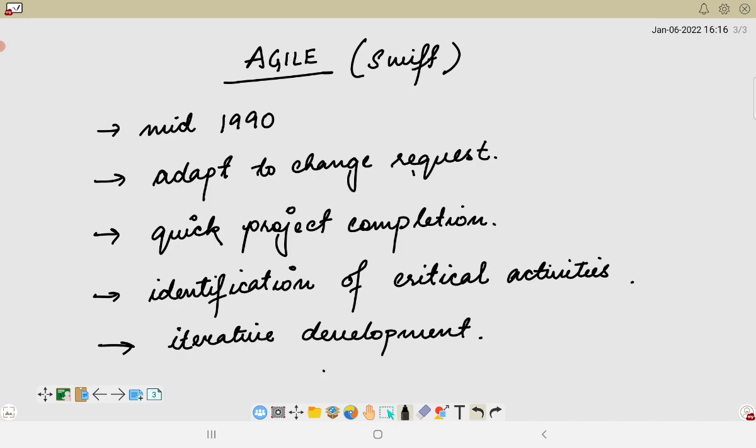The project scopes and requirements are laid down at the beginning of the development process, and the plans regarding the number of iterations, the durations, and the scope of each iteration are clearly defined in advance. Now, considering the Agile iterations of the project, each iteration is considered as a short time frame, and this time frame essentially needs to be short. And how long should these time frames be? These time frames basically last from 1 to 4 weeks.